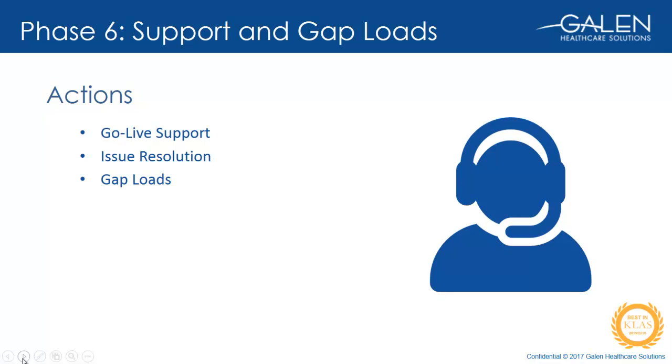And so there are lots of possible approaches here. We already talked about the client who wanted to take care of some of the gap mapping before the migration go live in the earlier slide there. Another client might decide to go into the go live with data from the original extract, and then as part of the migration activities, the gap data would be basically dealt with at go live. That can be done. Sometimes we do gap loads after go live. So essentially the gap analysis can take place post-migration go live also.